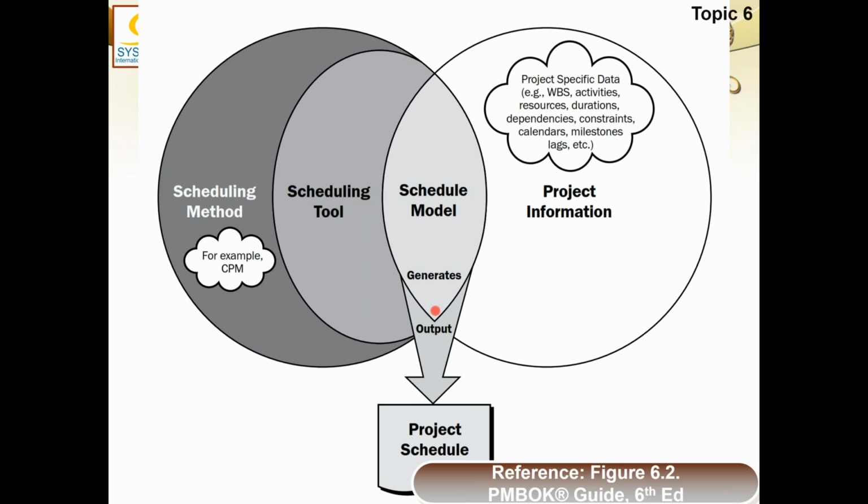Any change to the schedule will now have to be properly requested through a change request procedure. A change request form has to be filled and sent to integrated change control, which will decide the fate of that change. And ultimately, once it is approved, then the baseline is unbaselined, unfrozen, and those changes which have been allowed will be made to that unbaselined form. But once it is put in, the schedule is just like jelly.